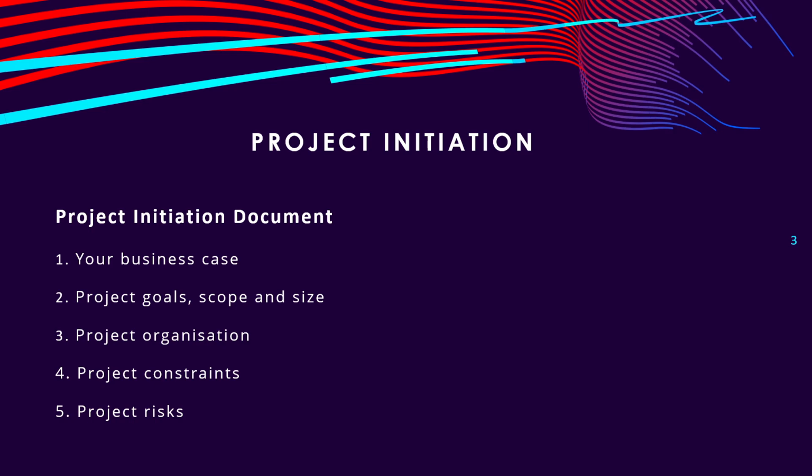Project initialization is the formal start of a project, in which you are going to have two important studies that you need to do. First is the business case study and second is the feasibility study. In the business case study, you are going to justify the need of the project and estimate the potential benefits of your project. While in the feasibility study, you are going to evaluate the problem which is in the market, and then determine if your project is able to solve that problem or if it is a good